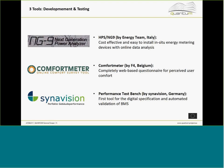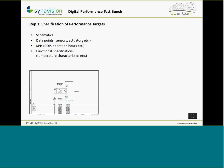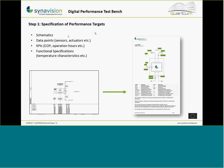I will go into more detail on the CineVision tool, which we call the Performance Test Bench. It is a technical testing specification and testing software. In the different steps, I can create a document that at the beginning of a project specifies — based on the design — what different target values are defined for individual systems or the whole building. It's a software defining individual data points: temperatures, operation mode of a pump, COP, KPIs, functional specifications on different operation modes.